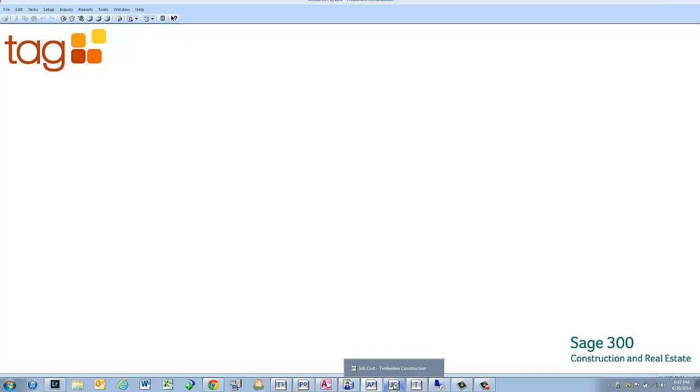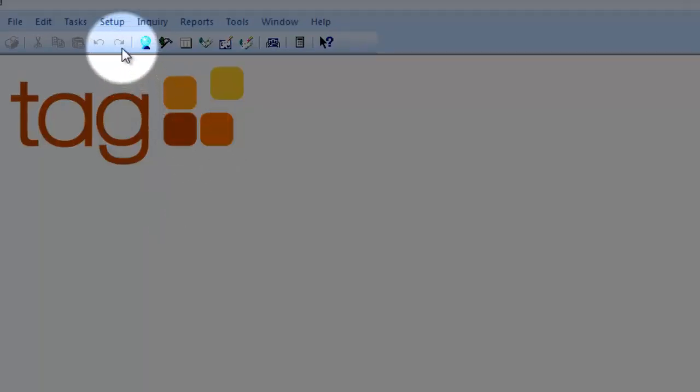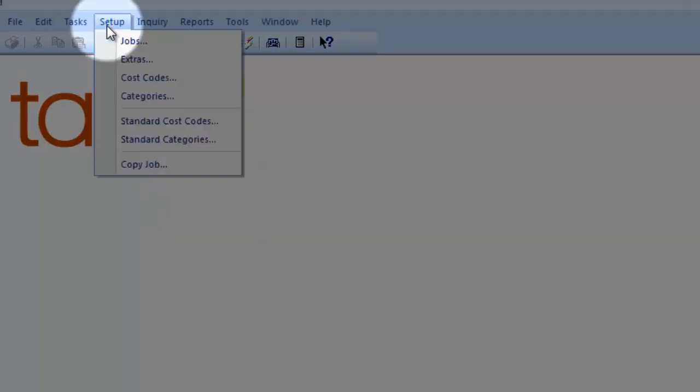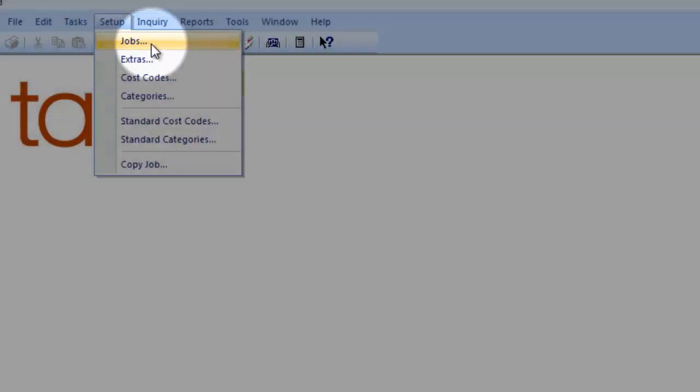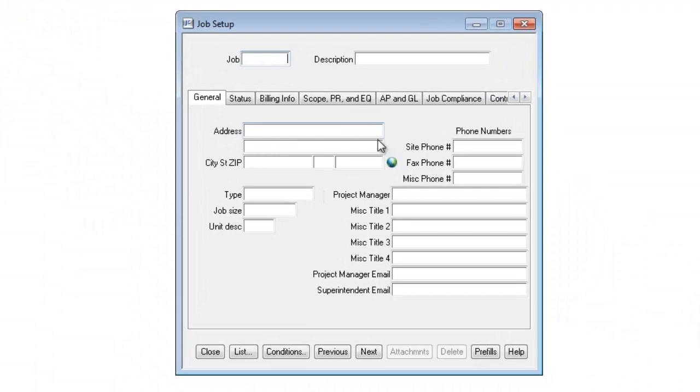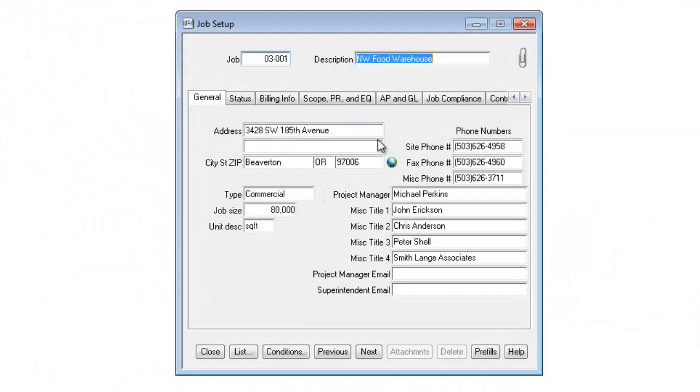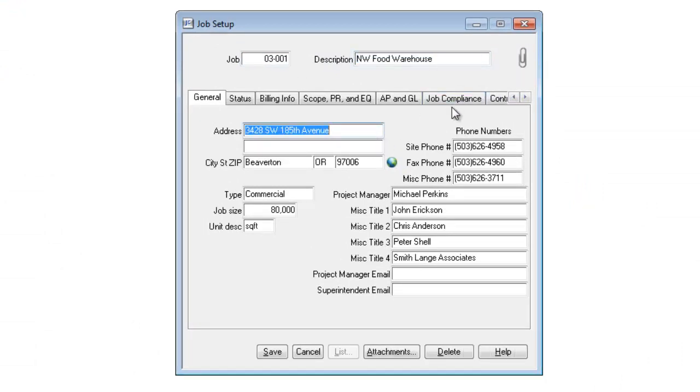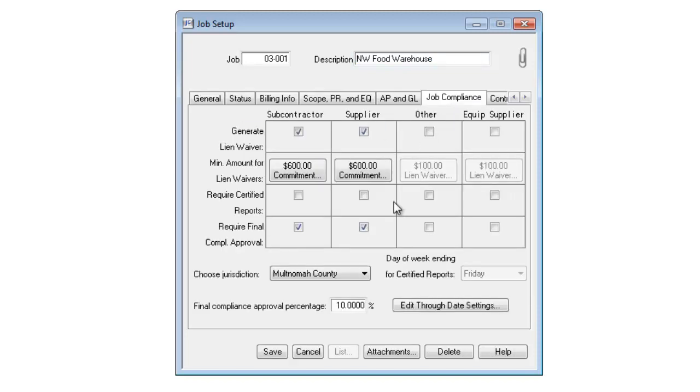Let's take a look at the job settings I need to set up. If I go to Job Cost and I go to Setup and Jobs, I'm going to enter in my job number. And now you'll see this button called Job Compliance. In here, I can select which types of vendors I want to generate lien waivers for.